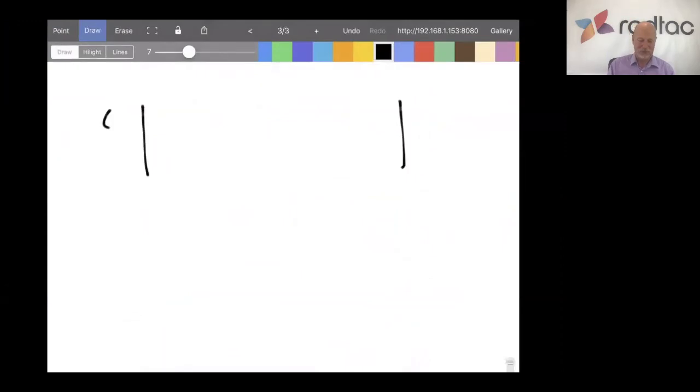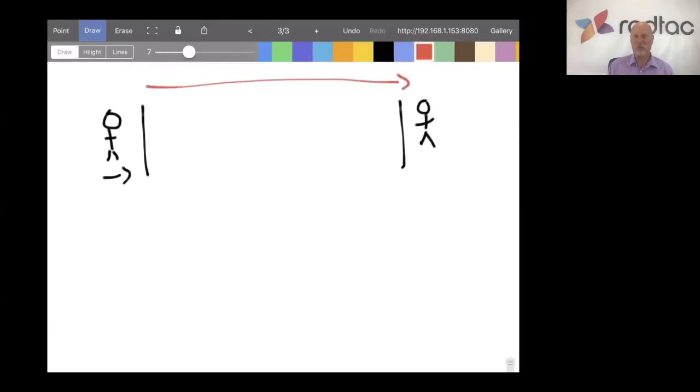So this is a customer who wants something. This is something coming into our system. Here's the customer getting something. So this is the lead time from the point that the customer says they want something to the point they get it, which is different to the cycle time. The cycle time is how long it takes us to cycle to deliver something out of the system. That doesn't necessarily mean it's going live. That's the lead time. So looking at our system, we have, let's say, 4 things that we do.